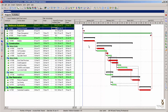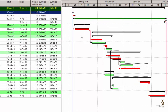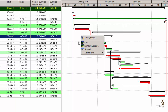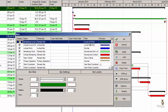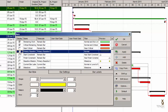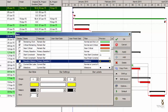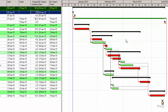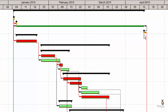Now, how do we see the results of adding these baselines? The first thing I would do is right-click in the Gantt chart area and choose Bars. I'm going to switch on some baseline bars so I can see the baselines. Scrolling down to the primary baseline, and scrolling a little further, we have the baseline milestone option here as well. I want to see baseline markers at where my milestones and activities are. If I say OK to that, you'll see that has appeared on the screen. There we have a baseline marker under the milestones showing up as a little yellow diamond, and we have a bar under each of the activities.